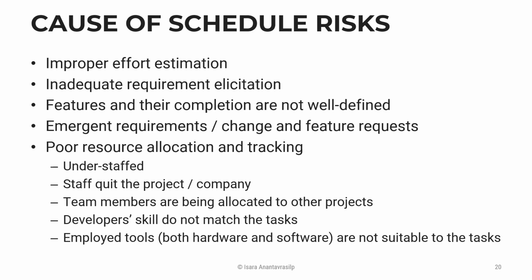So what could cause delay? First, improper effort estimation. What it means is that you know what you need to do, but you think you need less time to do it. Second, inadequate requirement elicitation: features and completion are not well defined. Though these two pretty much come together.